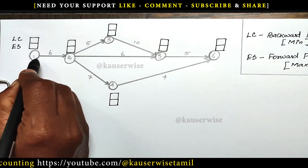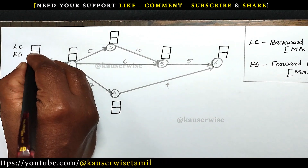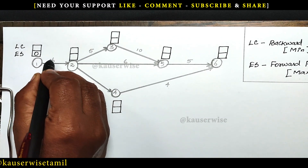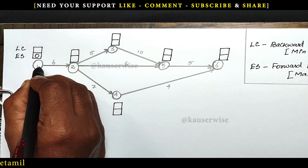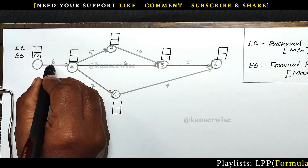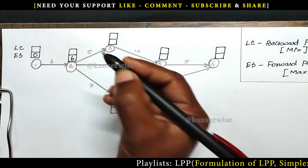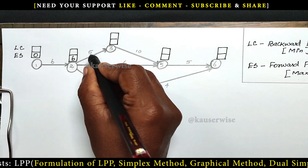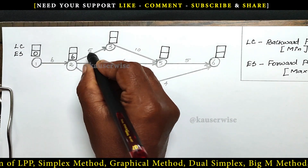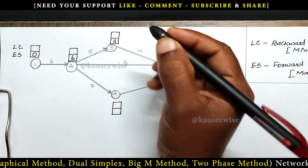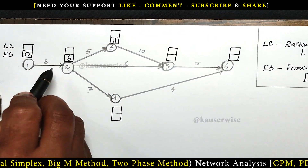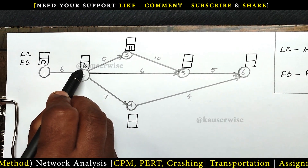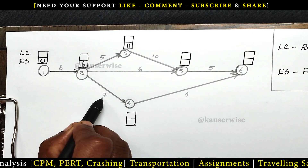For the first node, earliest start time is 0. For the next node, just add the duration to the previous earliest start time. So 0 plus 6 equals 6. Next, node 3: 6 plus 5 equals 11. Next, node 4: the previous earliest start time is 6, so 6 plus duration 7 equals 13.